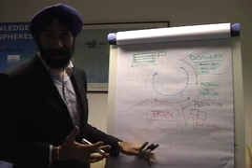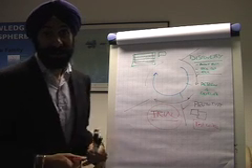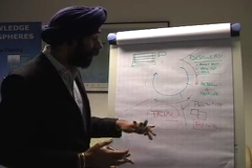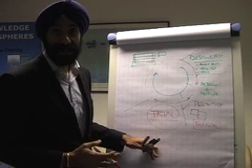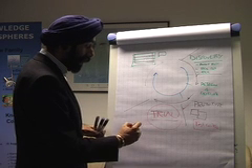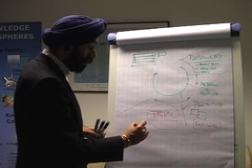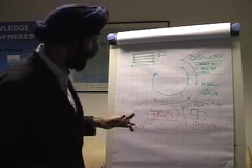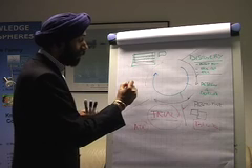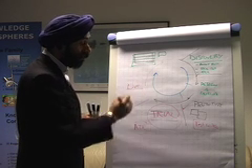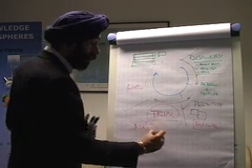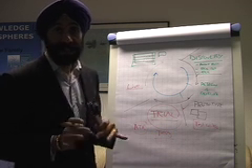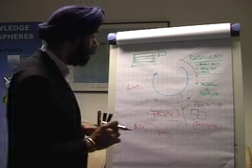So when we're trialing the environment, whether it be a new computer system or a new way of doing things or some new documentation, the trial can iron out any specific issues, and we can have an acceptance test report. That part there is quite important because that is effectively a sign-off to go live. We also may decide to trial a whole bunch of training techniques down here as well, so that we can get our training absolutely spot on before we continue on.